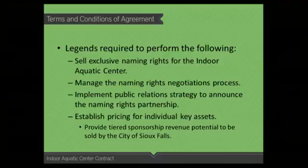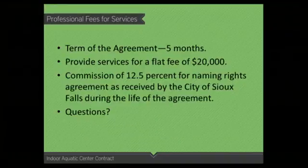But in this particular case, they believe they're probably best positioned to sell the actual exclusive naming rights on the facility, but they would provide that list of potential sponsor opportunities for the city to sell themselves. The term of the agreement is pretty short-lived. They expect that work can be done in about 5 months. They do propose, and we've agreed through negotiations with them, that a flat fee of $20,000 is appropriate.